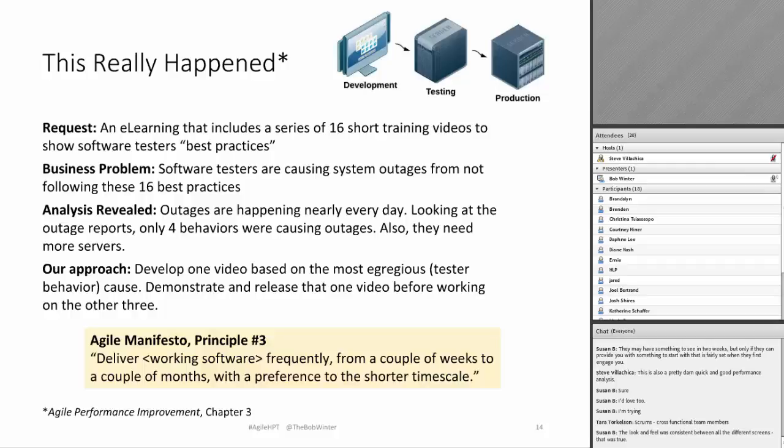But usually, I talked about replanning every 2 weeks. You don't really only plan every 2 weeks, right? You should be doing a bigger roadmap or a larger view, sometimes in software they call it a release level view. Like what is the stuff that we're going to create over the next 3 months or year or whatever, and roughly lay that out by time period. So the first quarter, which is like 5 or 6 sprints, we're going to do this stuff. Then the next quarter, we're going to do these things in the 5 or 6 sprints, etc. And at the end, we should have something that roughly looks like what we thought of at the beginning.